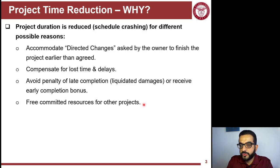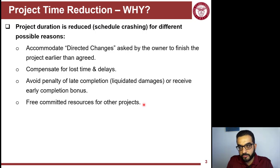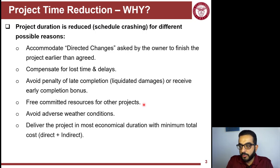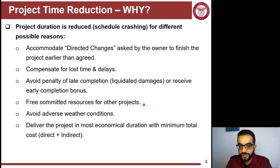Another reason is to free resources to move from this project to another that is behind schedule. For example, if you have a heavy crane committed to this project and need it on another, you accelerate the activities using the crane so it's free to move once done. Other reasons include anticipating bad weather — trying to achieve as much work as possible. And lastly, achieving the optimal project duration to account for the time-cost trade-off.